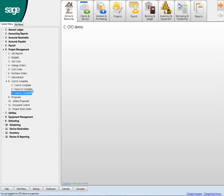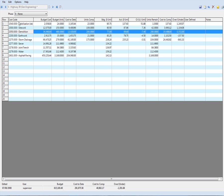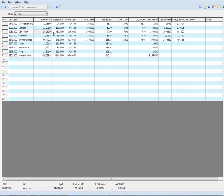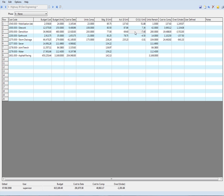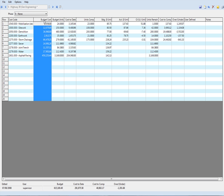The other one that most of our clients use is this one here. I'll just look at this item. Your items will be here like planting trees, shrubs, sprinklers, or whatever. So I budgeted $36,000. I had 480 - that could have been the 480 sprinkler heads to do, whatever it is. This is what I spent either in accounts payable, inventory transfers, equipment costs, or payroll costs. This is how many units I have complete. So I budgeted $77 a unit to do. It's costing me $69, so I'm $7 under budget. This is what it's going to cost to finish the job, and this is how much under or over budget I'm going to be. Once you start getting some history in here, I can come in and look at 36-inch trees for the last couple jobs and say, we're budgeting $28 to plant them, and it's actually costing us $38. Well, now I can tweak that estimate, include the $38, which is just going to get you better estimates as you go forward.